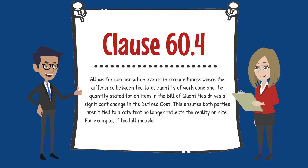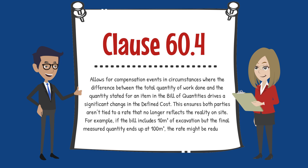For example, if the bill includes 10m³ of excavation but the final measured quantity ends up at 100m³, the rate might be reduced to reflect economies of scale.